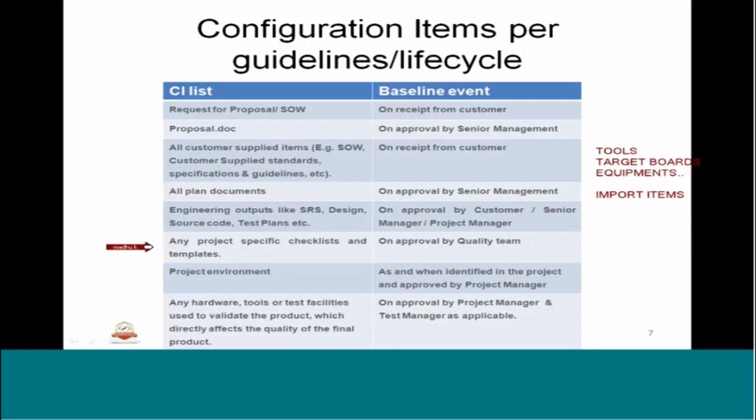And any project specific checklists, templates, this also can be configuration items, and this basically needs to be approved by the quality team so that the baseline can be created. Then we have the test environment or the project environment. This will be identified as and when in the project and approved by the project manager or the test manager.